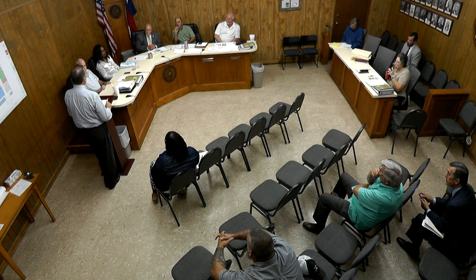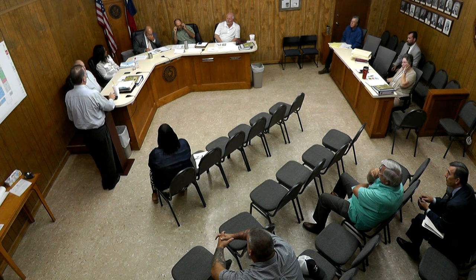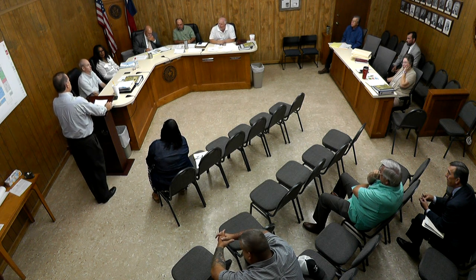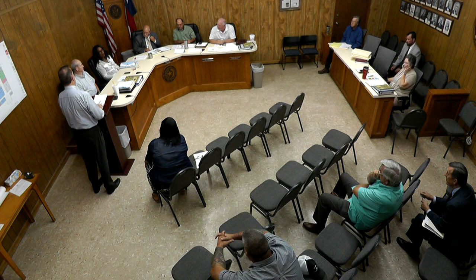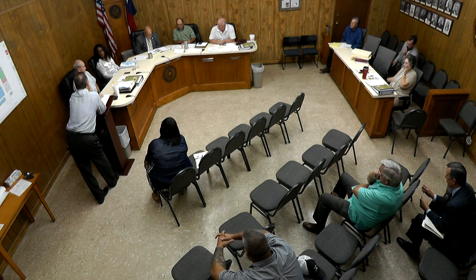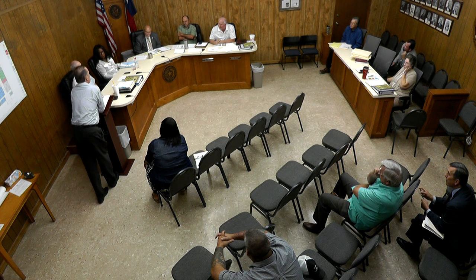I don't want to be the low estimator on bid day. And then we've gone through all the detailed drawings and we come in at that building at 10 million. Then we have to regress and redraw and go out to bid again. I think realistically, like Al said, you're always going to run into overages or other things you have to look at. So if you're just looking at a building for eight, Philip, I don't see it happening. Well, this is a conservative number with contingencies put in there. What percentage of contingencies? 5%.